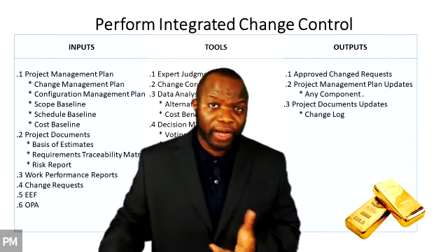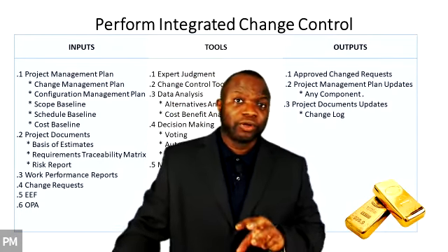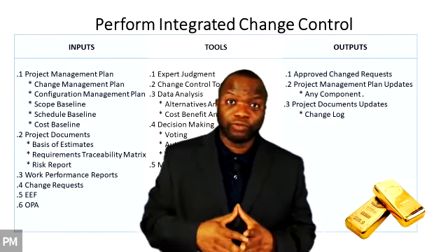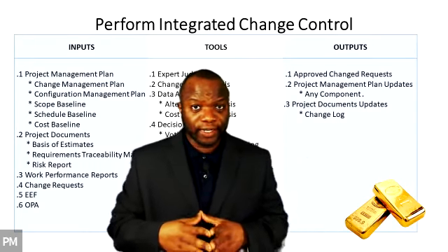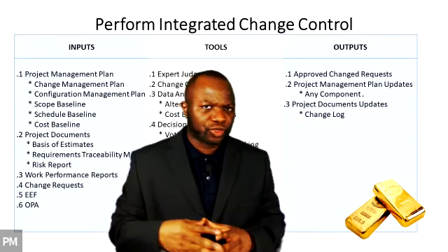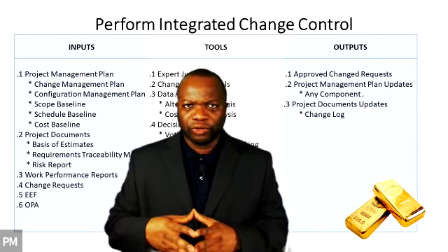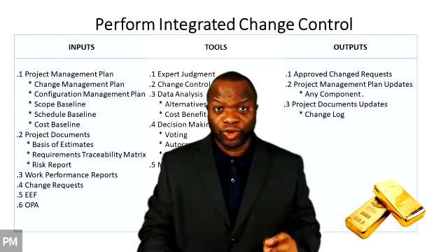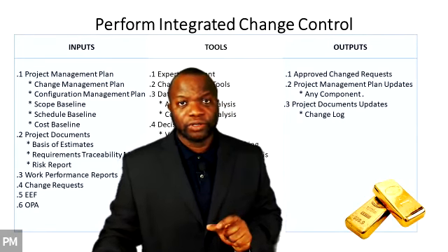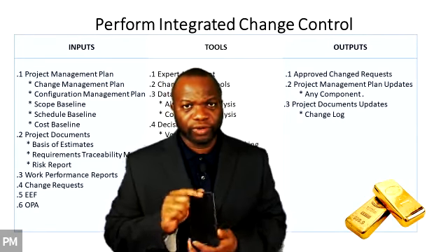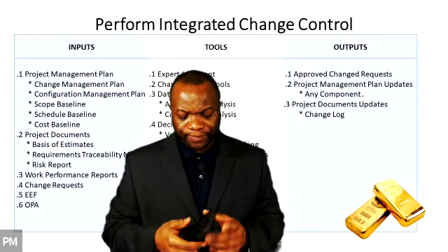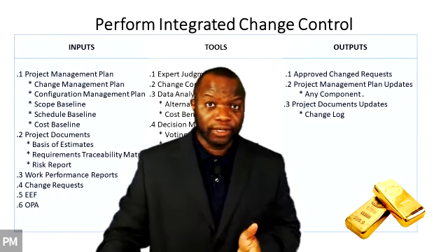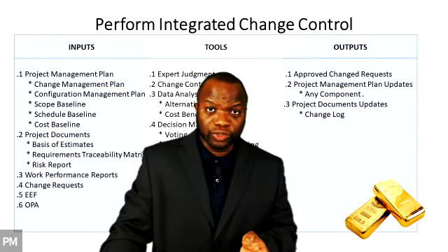And then parts of configuration items could also be things like your WBS. Some companies say we want to make this configurable, want to know what version it is, so we're going to tightly control the version keeping of the WBS and the elements that are added and so on. So we can take this to the nth degree, but to make it simple for yourself, you just got to remember, oh yeah, we're going to make this stuff configurable. All right, if it's there and it says this should be configurable, you got to be tracking it using a configuration management approach.